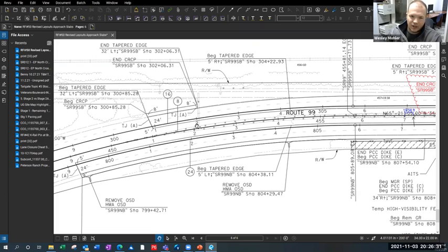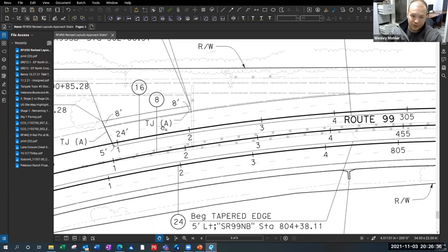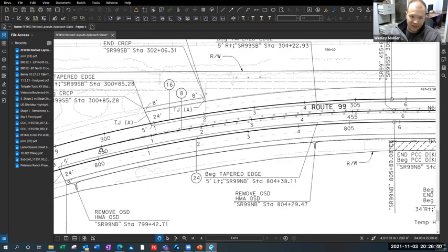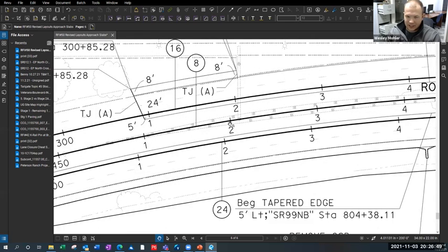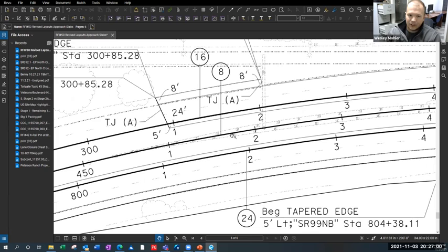So if you wanted to know how wide your road was going to be at this portion, you would have to reference it by station. So this would be 451 plus 50. The distance between every station, I can't stress this enough, is 100 foot. So it's 100 foot for each station. From here to here, it's 100. From here to here, it's 100. But if you wanted to know right here, you'd have to consult the typical cross section.